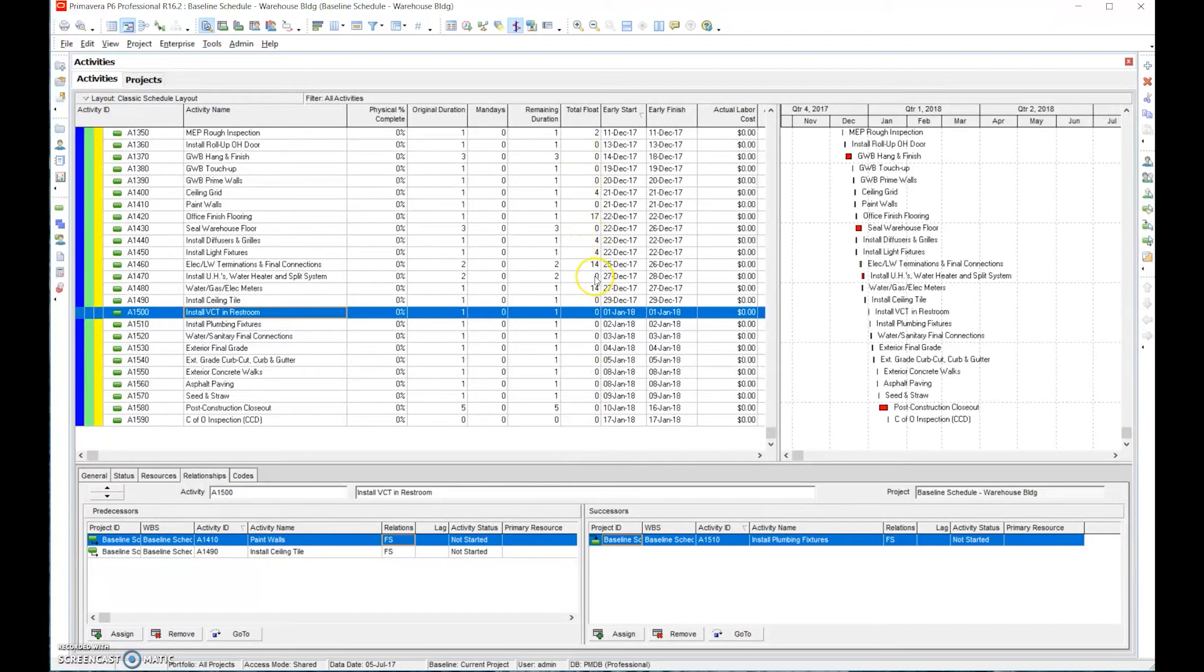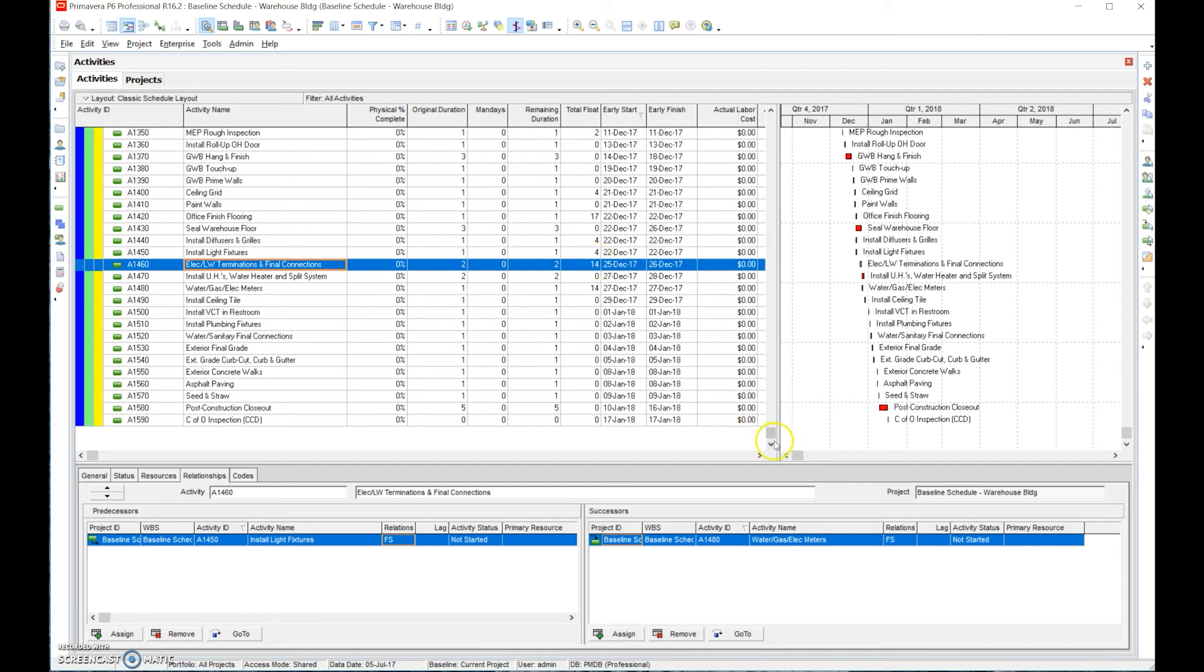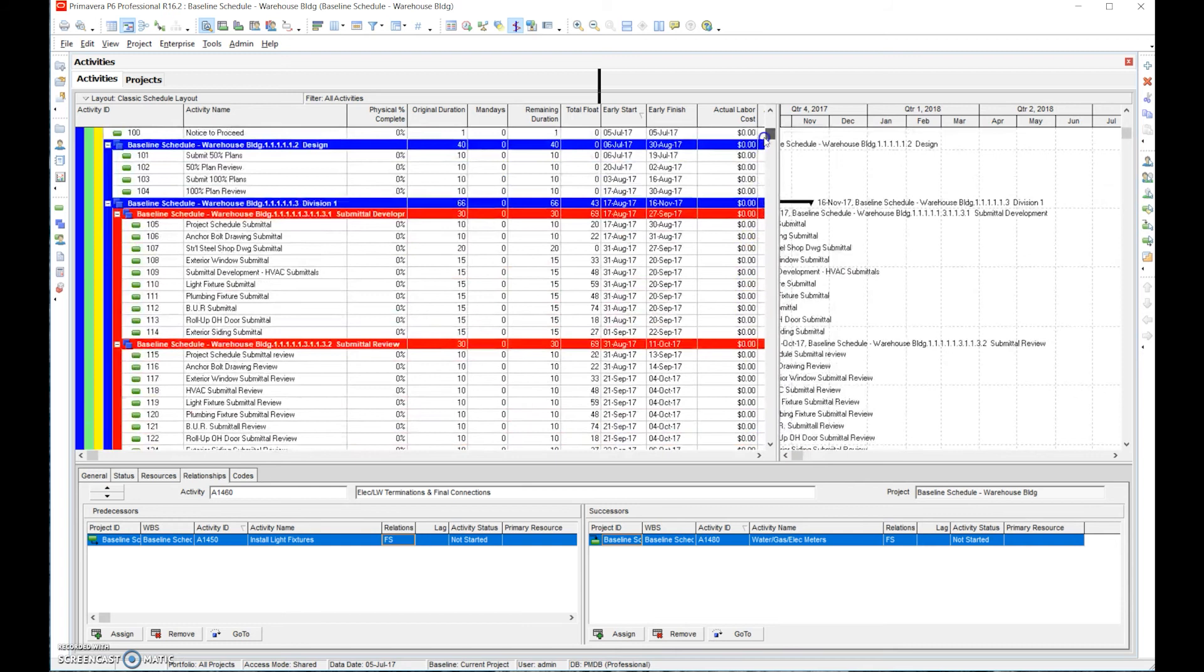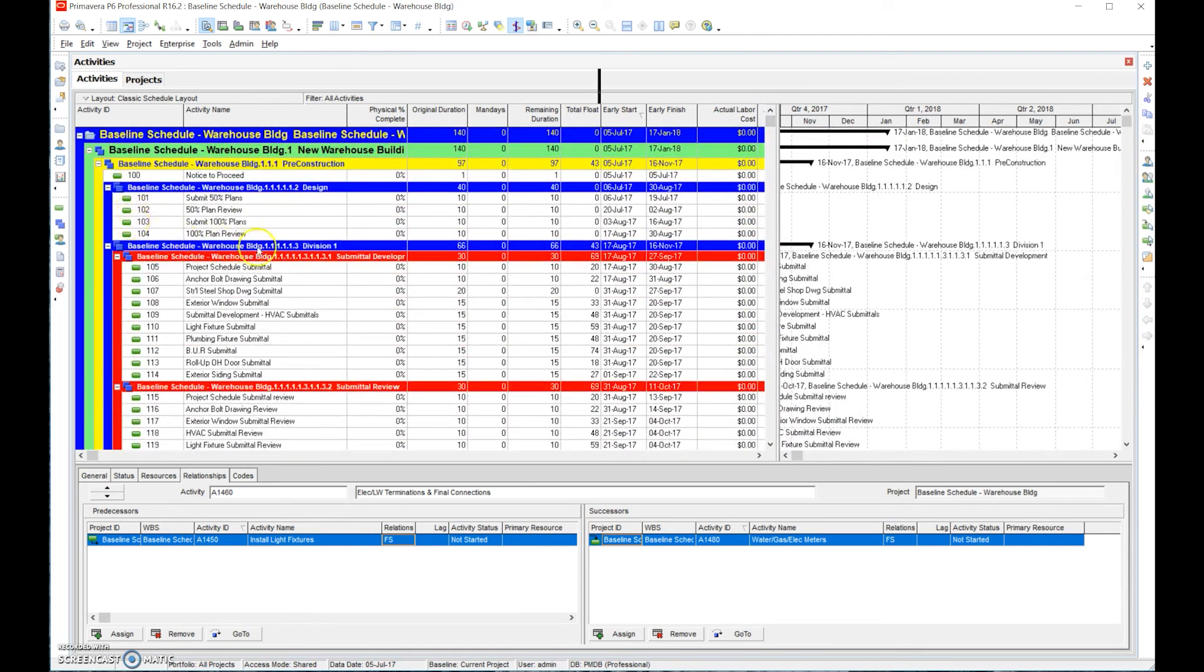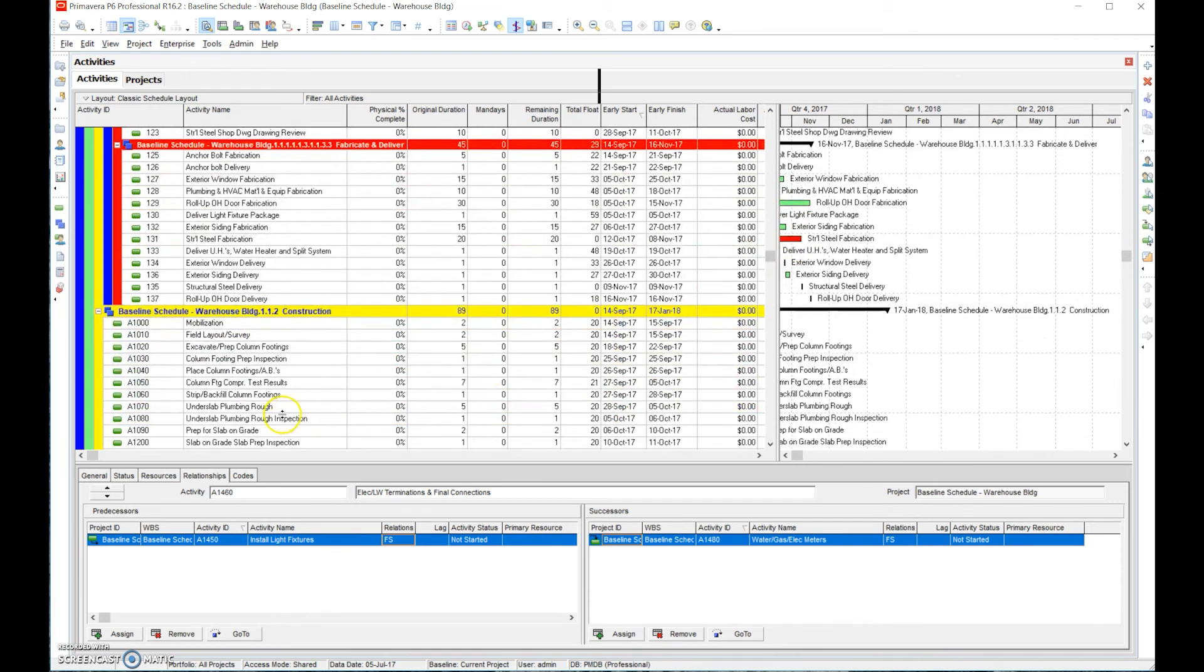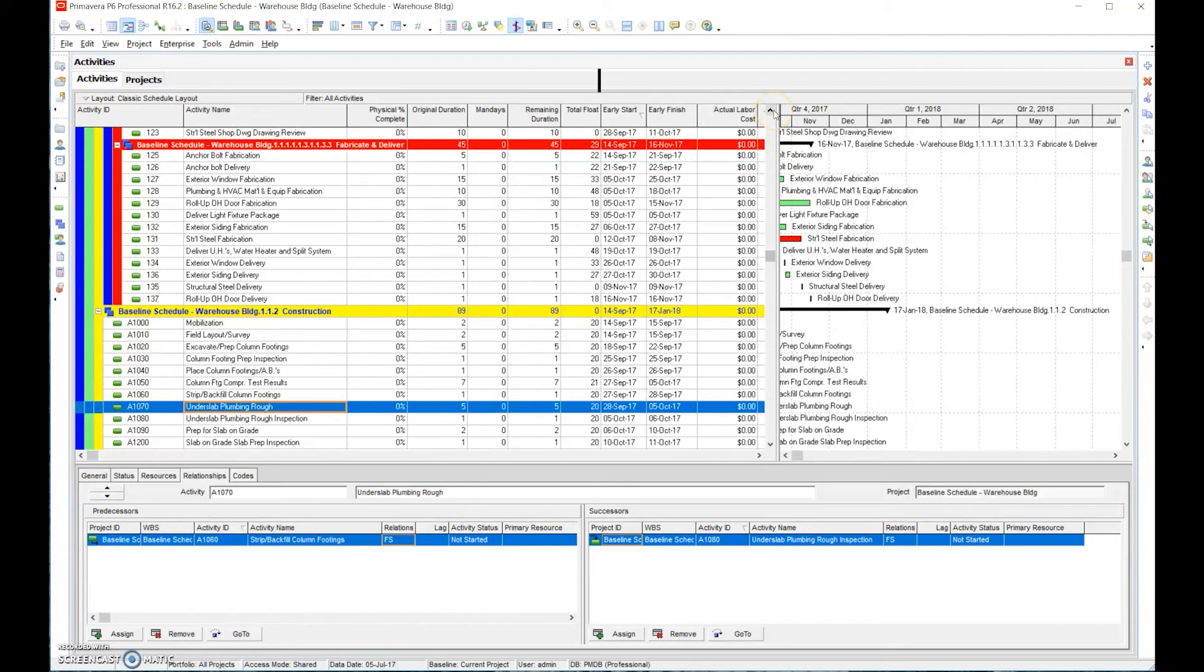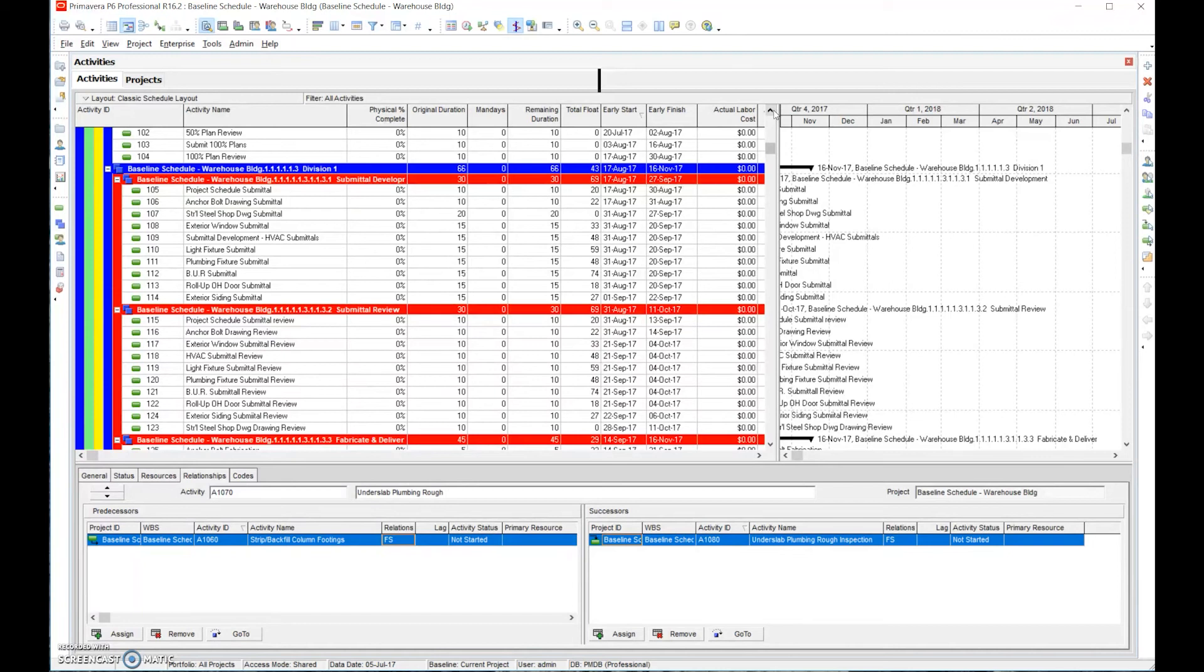It's important that those numbers mean something because we know that this activity right here, electrical terminations and final connection, we have 14 days of float. This activity could push off 14 days without affecting the completion of the entire project. That's why we want to use float. You'll notice when we go through, most activities will have a successor. The ones that typically don't have successors are pre-construction, things like submittals. Because we don't naturally think, okay, we want to place under slab rough in, we don't naturally think what submittal takes place before that. We think logically of construction. And that's why we want to do everything methodically. We want to go through and put all the predecessors in, come back and then put all the successors in. Because we'll see that some activities do not have successors, and we want to fill those in.